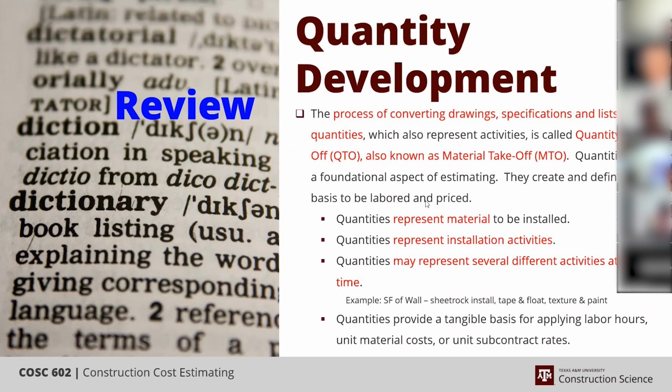Particularly if you're an EPC, if you're a general contractor, regardless, you're usually pretty much left to having to quantify things on your own. So that means you're going to have to convert to one lines and those types of drawings to take off, which is a whole unique specialty in and of itself.